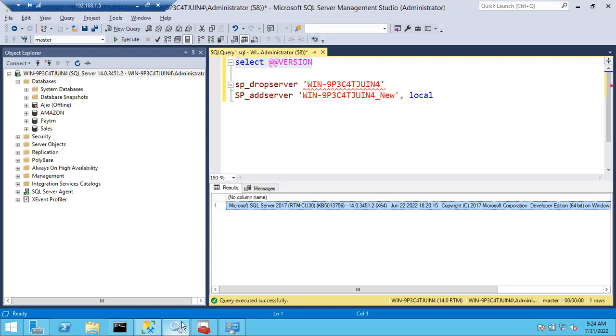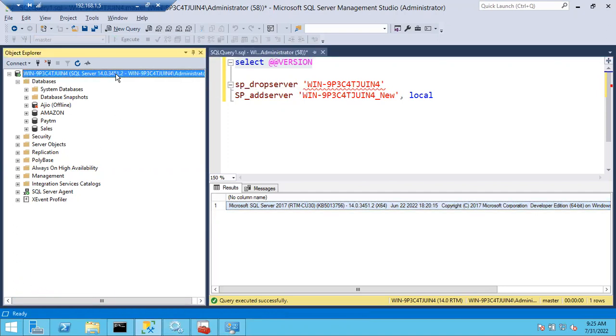And before patching you have to send an email to the customer that you are proceeding to patch the SQL Server. In that email you have to include the customer email ID, and you have to include the DBA team email ID. Why? Because imagine you are working from Bangalore location, another guy is working from Hyderabad location. He doesn't know that you are patching this SQL Server. Suddenly he might get alerts that the server is down, he might get some email alerts.